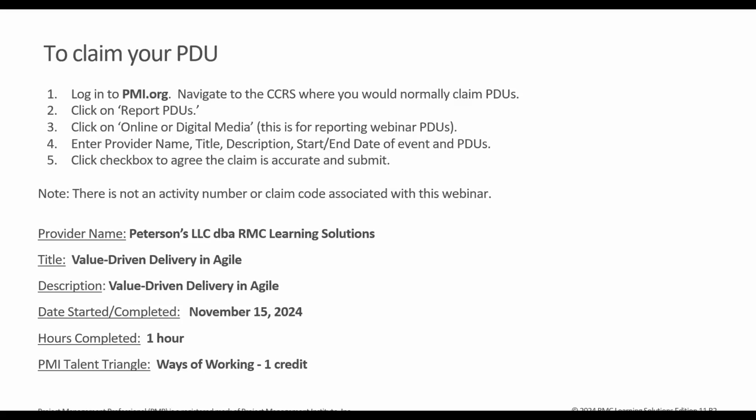Handoff. Okay, good question, Tony. Your question is, why is handoff considered wasteful? If we're handing it off multiple times, that can be considered wasteful, rather than going from the source directly to who's going to be doing the developing of the product. Things get lost and fall through the cracks the more handoffs we have. Then we're wasting time figuring out what was left behind and what we did wrong.